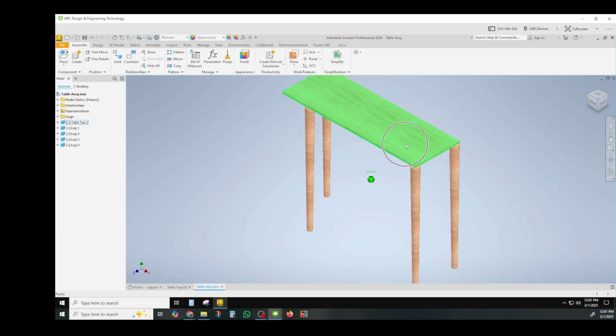And so this is bigger. And I know it's bigger by a certain amount, and I can figure out what it's going to cost me. I'm going to have an extra 12 inches, and I have to buy extra 12 inches of material, and I have to sand 12 inches of material. But it's not going to cost me any more to screw these legs in. There's just four of them, and I'm going to screw them in or however I attach them. So my direct cost for manufacturing is increased by the size of this material. So let's go look and see how we'll take care of that.